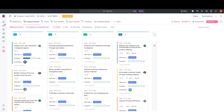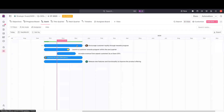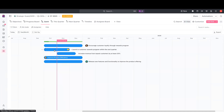Let's take a look at another view that is super powerful for visualizing start dates, due dates, and you can also see when a task is a milestone and any dependencies. In ClickUp, that is best visualized in the Gantt view. Notice here this yellow diamond-shaped icon on this task card — that is indicating that this task is a milestone task and something that's critical to the completion of this objective. Creating dependencies is super easy from the Gantt view. You're also able to create and manage dependencies from the list view, but in Gantt view, you could easily drag and drop to create the dependencies and then visualize them on screen in an easy-to-understand way.